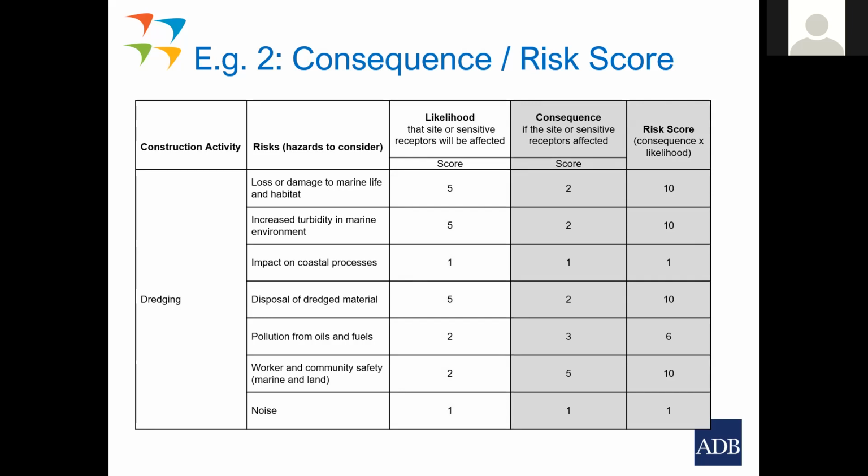Impact on coastal processes, we've already discussed that. It's the consequence, 1, because we know from the modelling that it's unlikely to have an impact. The disposal of dredged material, well, moderate. Again, this is based on the fact that we know that the dredged material in Vanuatu or Port Vila is not allowed to be dumped at sea.